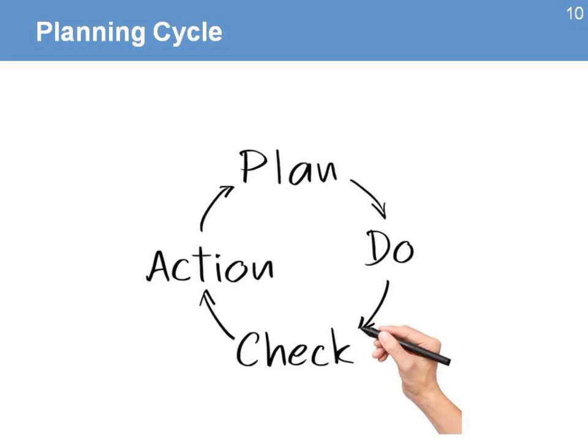That means that no matter how good your plans are, by the time you're implementing, you're going to see there are changes that force you to make modifications. So the idea is that you plan, you try to complete your plans. They don't need to be 100%, it could be 80% complete. And with that information, you start doing your work.